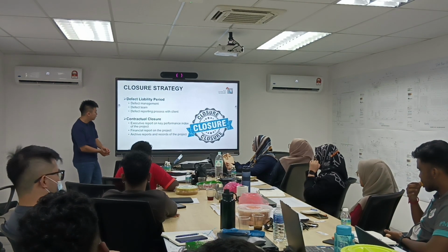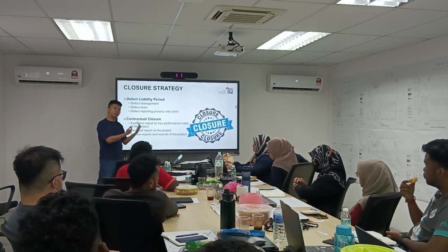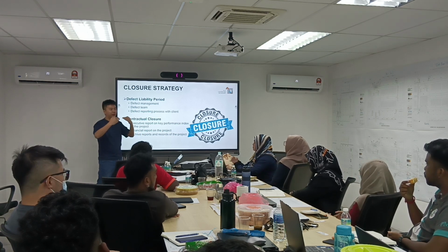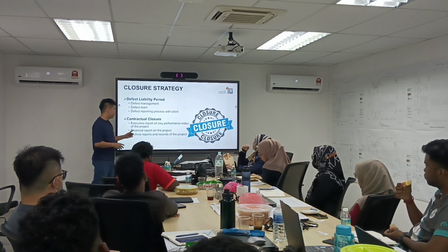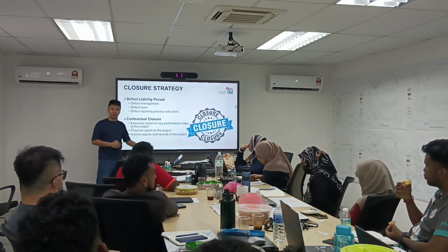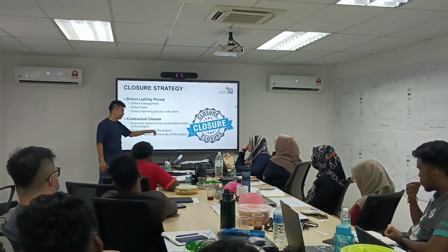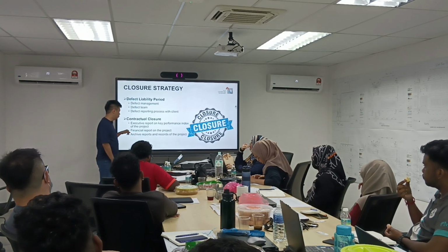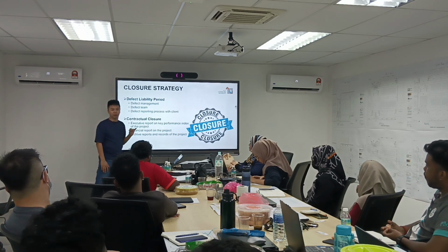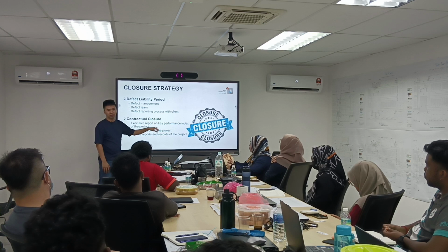Okay. Then after you do that review, of course, all this feedback will be gathered lah. Then the next project, people will start to push it to make it better. Okay. Then once you're done with the CMGD, at the same time means that your project is totally ended. So means that there will not be any more financial transaction after that date. So this is your final financial report already. This is a time where your real how much money you make happen.